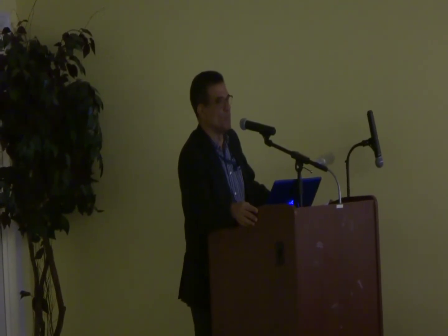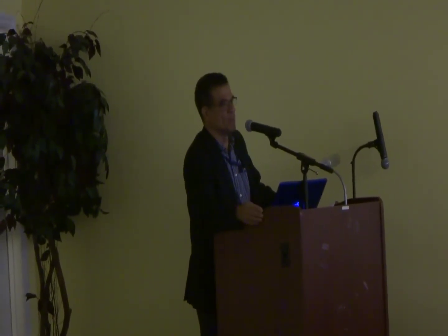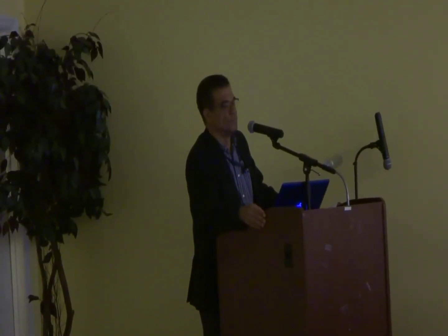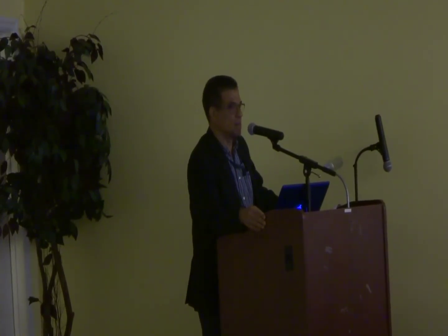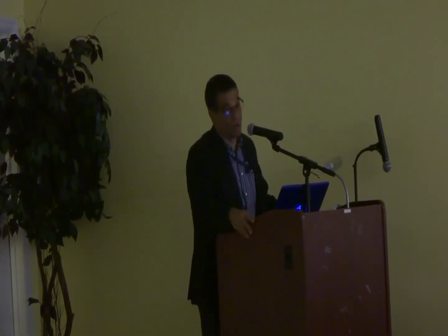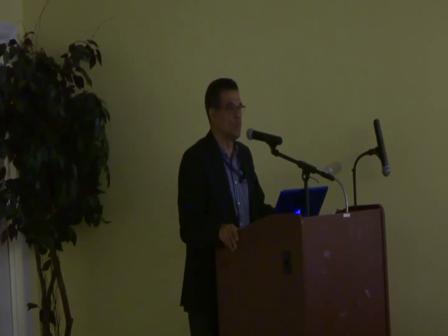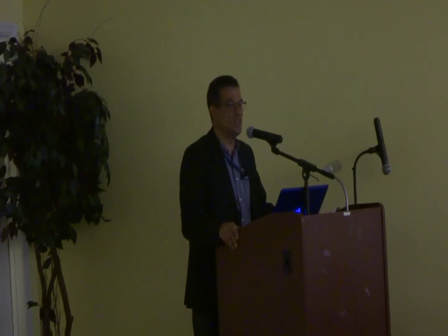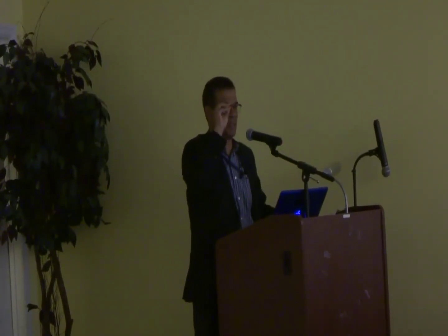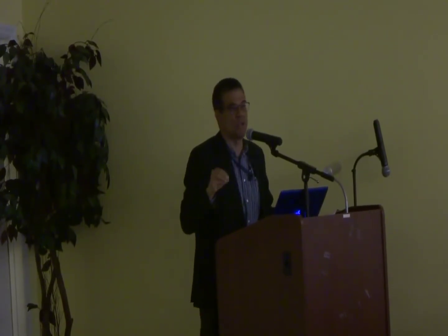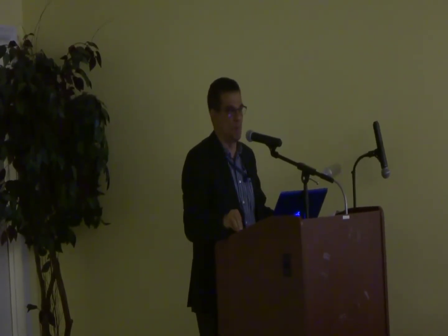The first envelope that is open is the technical tender without pricing, because this happens where quality and technical issues are so important and so tricky. The project may not be complex overall, but there are some tricky issues in the tendering, and you want to make sure that the contractor who's doing it understands the project.